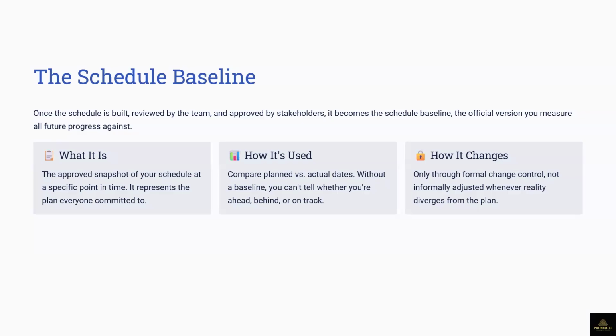So for example, if you have an additional scope and as I'm working, my percentage is showing like 40% completion against that baseline. Now, if somebody adds additional scope, automatically you cannot be at 40% completion again. You understand? I can't be saying you're at 40% completion. So something changes. And so that's why I have to go and reset the baseline to really recalculate what the percent completion is, because additional bigger scope has been added.